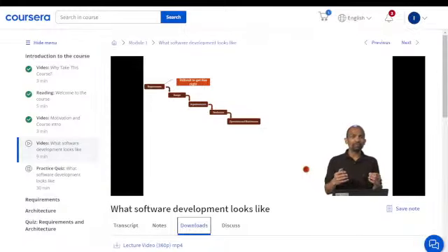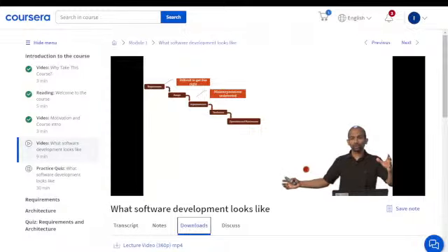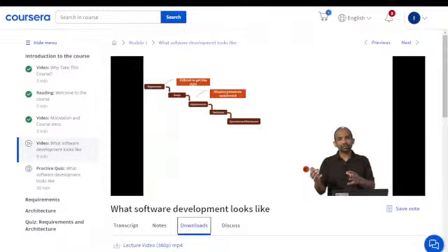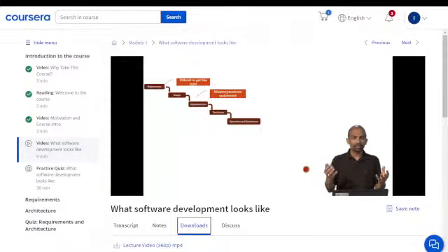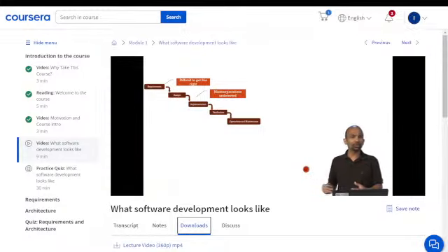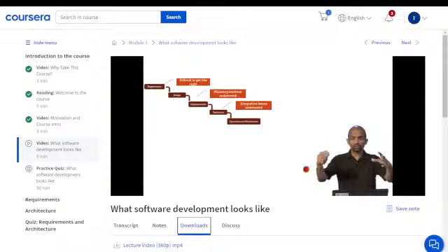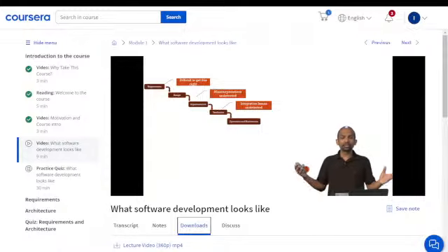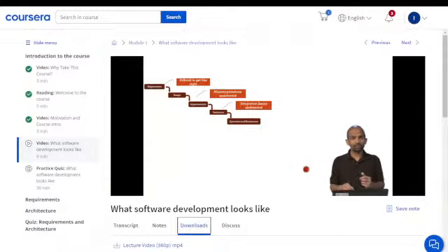For example, they found that it's very difficult to predict the requirements 1 year or 2 years ahead, as the market changes, or sometimes it's just very difficult to predict what a user will like or not like. And since the cycle is a year or 2, it is possible that the developers or the architects misinterpreted the requirements, and that misinterpretation will go undetected all the way through design, implementation, and verification. Similarly, integration issues between the different components go undetected for a year while the software is being developed.